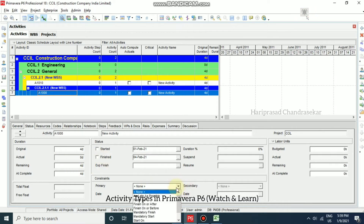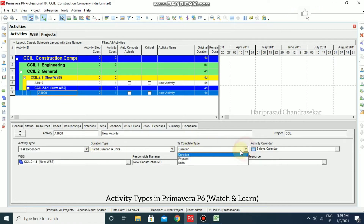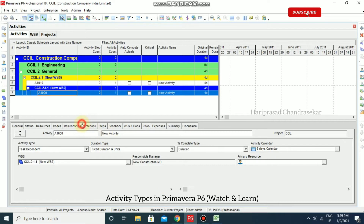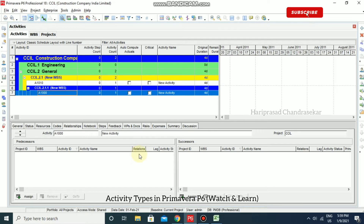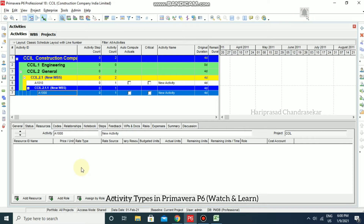If you want to add constraints, you can do that here — we will see that later. In General, you also have Activity Type, which defines what type of activity it is, and the percent completion type — whether it is duration, physical, or units. You can define relationships to other activities using the Relationships tab, where you can add predecessors and successors. You can also assign resources and add roles, which enable you to identify skill requirements for staffing the activity.